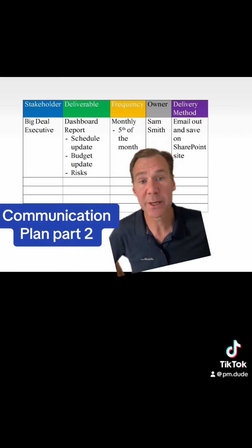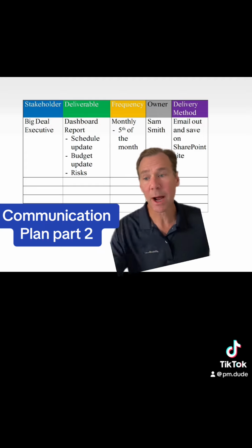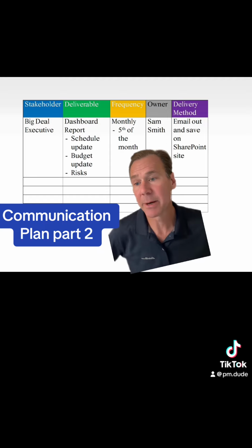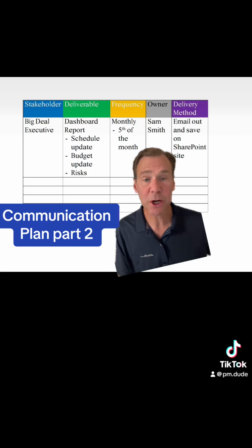The second thing you're going to do is ask, what's the deliverable? What am I going to deliver to them? You can see here I have a dashboard report, but I also say within that dashboard report, I'm going to give you a schedule update, a budget update, and I'm going to talk about risks. That's what the deliverables are. You don't want to just say, hey, dashboard report, because they might not know what that means. So give a little bit more detail of what that is.